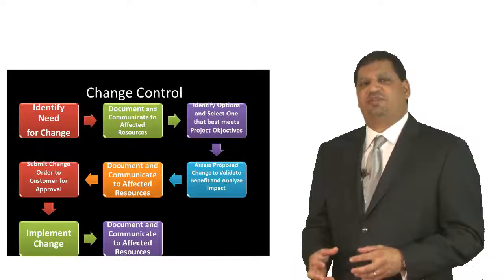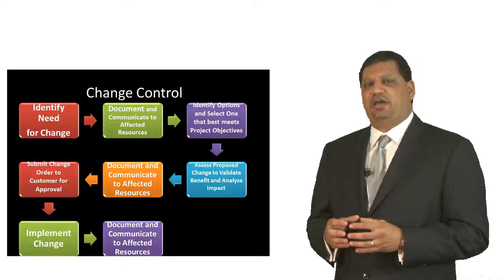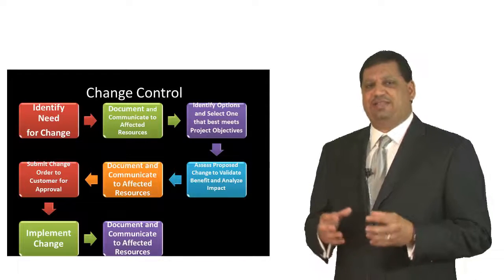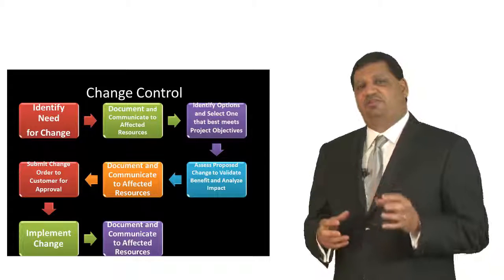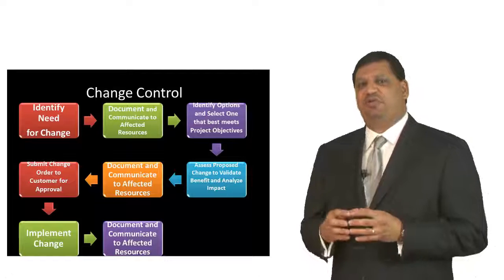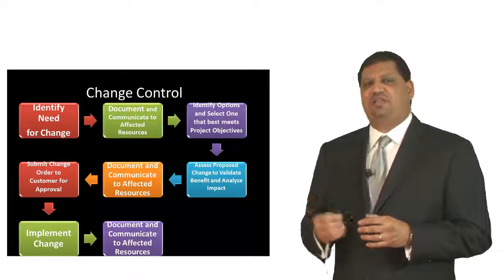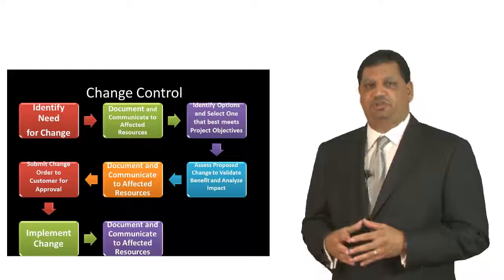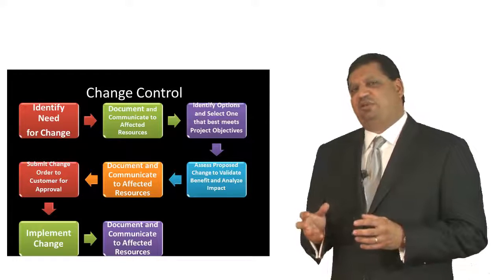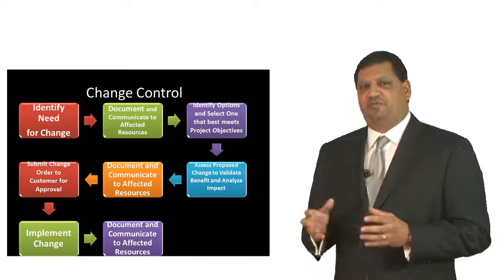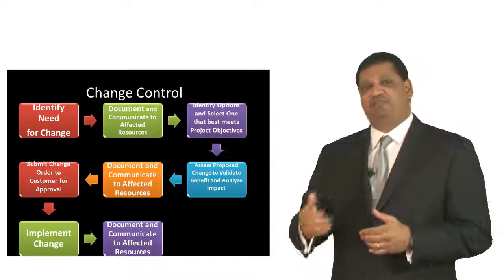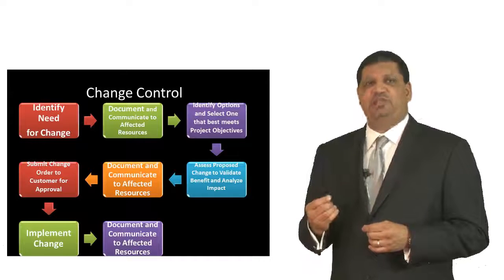The change control process is a key element of project success and adherence to timeline and scheduling. Now, the first thing that we need to understand is a strict change control process will actually create much more satisfied clients than a loose or faulty change control process. So let's take a look at the steps that need to be executed during change control. First of all, when there is the need to deviate from the established project plan that has been accepted by the client, we need to initiate change control.